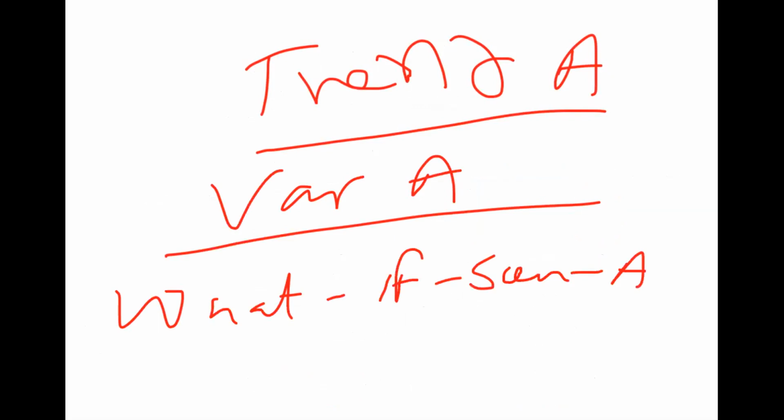And most commonly, we will talk about the Monte Carlo again here, but you don't need a Monte Carlo to do a what if scenario analysis. You need a piece of software, some sort of method to substitute values to find out what happens if this variable ends up being more, less, equal, whatever. And we could use things like Microsoft Project and Excel for this.